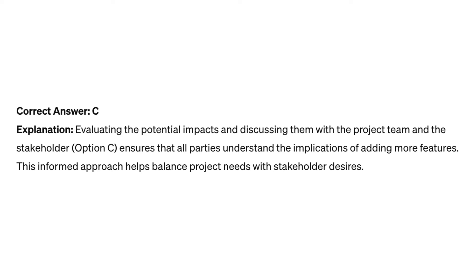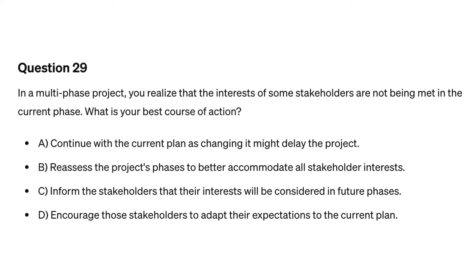Correct answer: C. Evaluating the potential impacts and discussing them with the project team and the stakeholder ensures that all parties understand the implications of adding more features. This informed approach helps balance project needs with stakeholder desires.